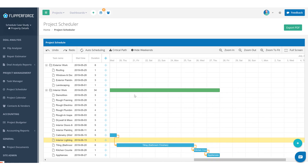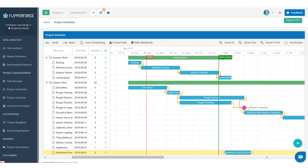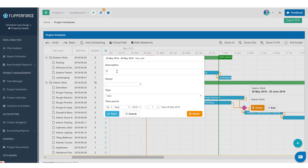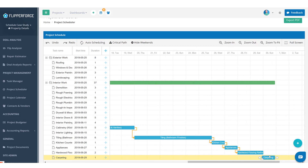The last couple items we need to add are flooring. You really want to wait until the very end to install carpet or refinish hardwood floors, because you don't want contractors tracking dirt on brand new carpet or scratching hardwood floors. Let's add hardwood floor refinishing — that's probably going to take two days. We've also got carpet going in the bedrooms, which usually takes about a half to full day. Let's add carpeting as well.